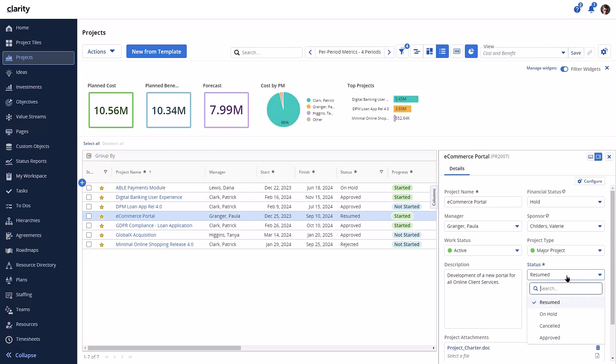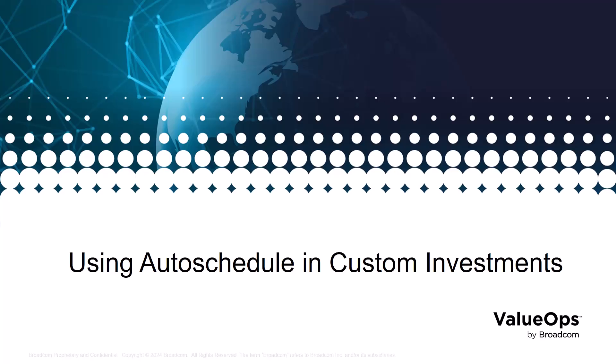With this final implementation, users will save time in updating the field with valid values presented. Many of our customers have asked for the ability to use auto-scheduling in custom investments to maintain a disciplined approach in investment management. The Clarity Auto-Schedule algorithm is a feature that automatically schedules tasks and investments. It uses predefined parameters and dependencies to optimize the scheduling process. By leveraging auto-schedule, investment managers can save time and effort in creating and adjusting schedules, leading to more efficient task management.